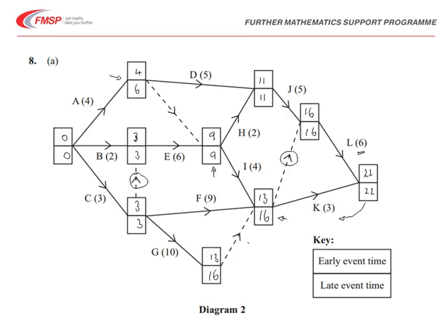The critical activities then, well, we check through the diagram. The critical activities are those that are joining events with times which are equal to, where the early time and the late time are equal. So the critical events, if I just mark those in first of all, we can see that I just mark a red dot at each of these, and finally at the top there, 11 and 16 and 22.